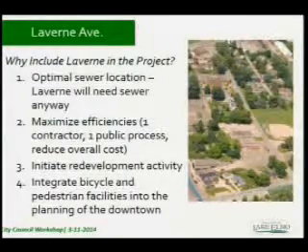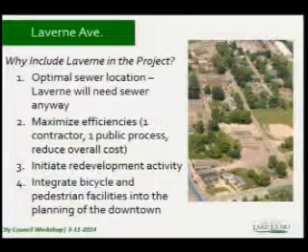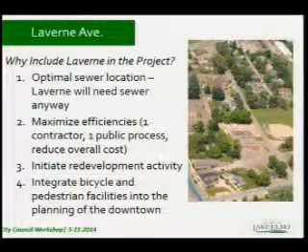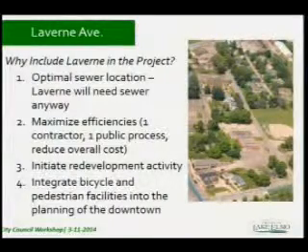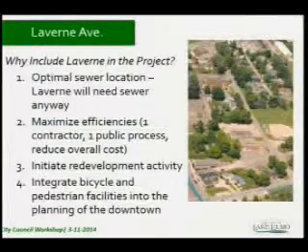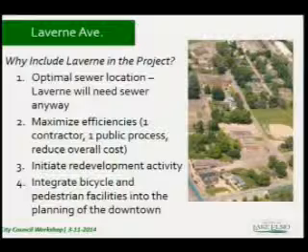More than likely, because sewer does need to be in Laverne, if you don't do it all as one project, you're going to have to come back to Laverne Avenue and do it the following year, 2 years from then, whenever. So the issue with that is now you're talking about an additional public process as part of getting out in front of all your property owners, all your taxpayers, and explaining the scope of the work, whereas you could encompass that all into one process. That doesn't have the dollar and cents cost savings like it will at the end of a bid, but there is all the soft costs of all of your staff working with all the members of the community and doing it in an additional separate process.